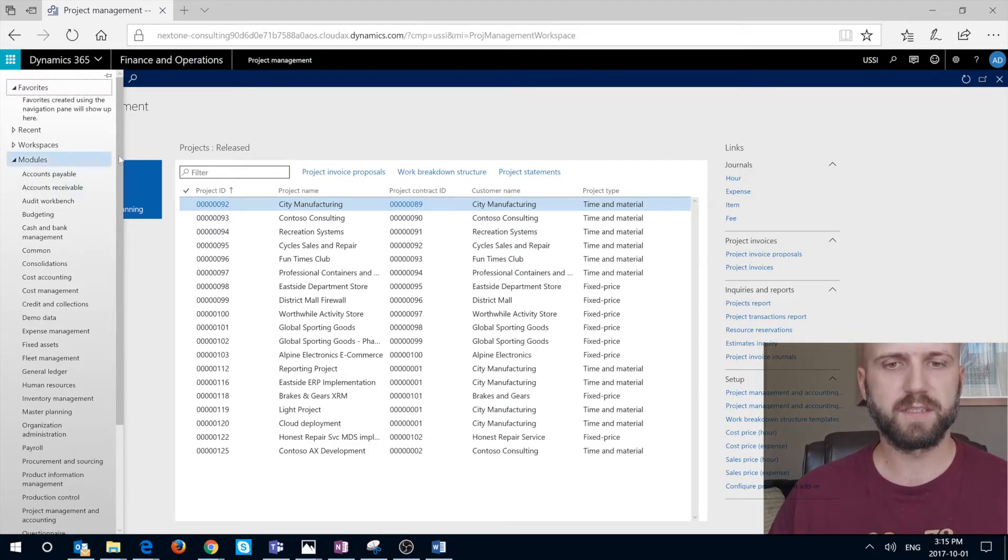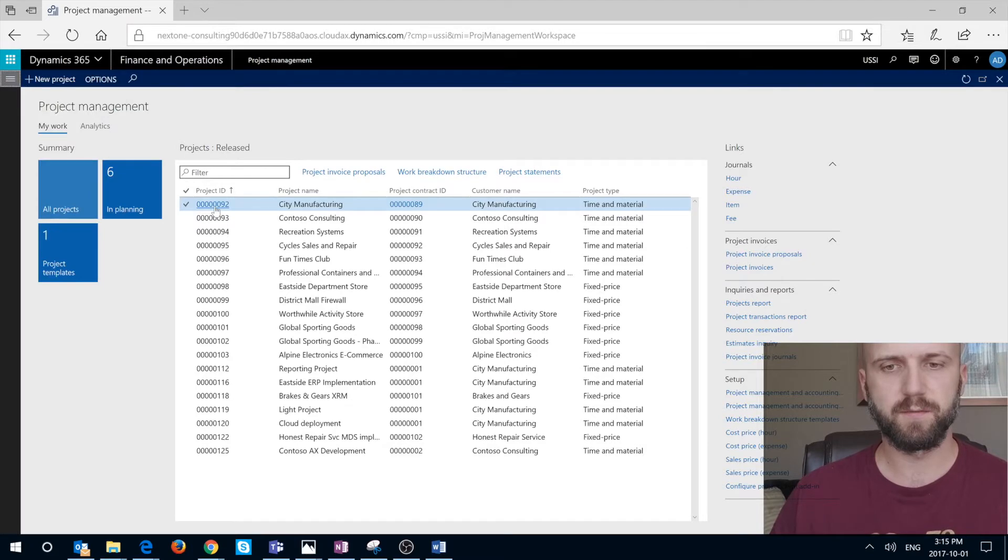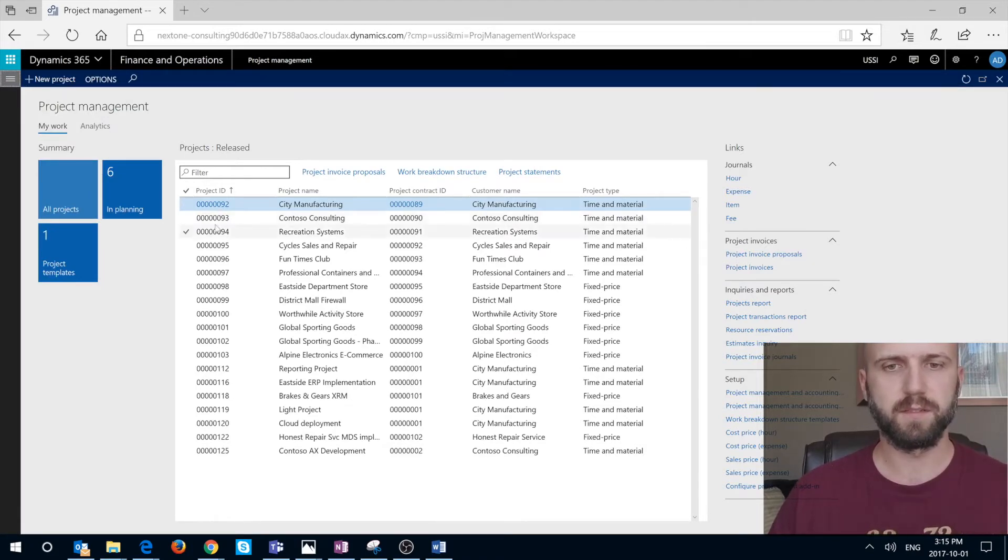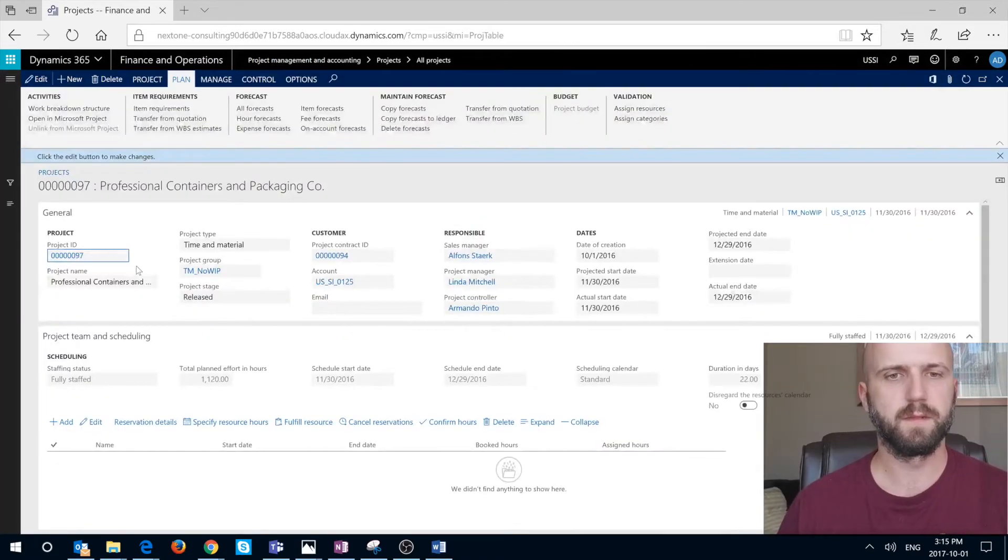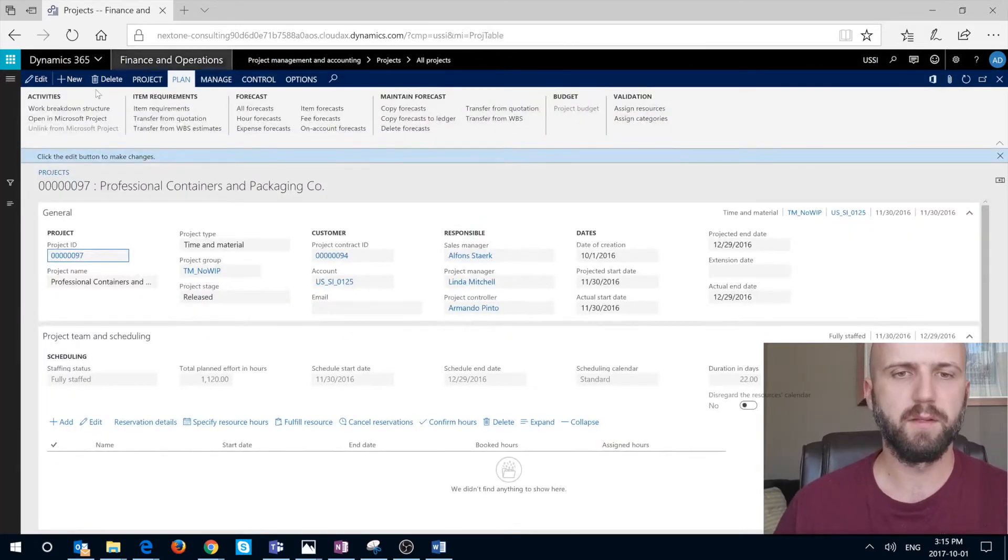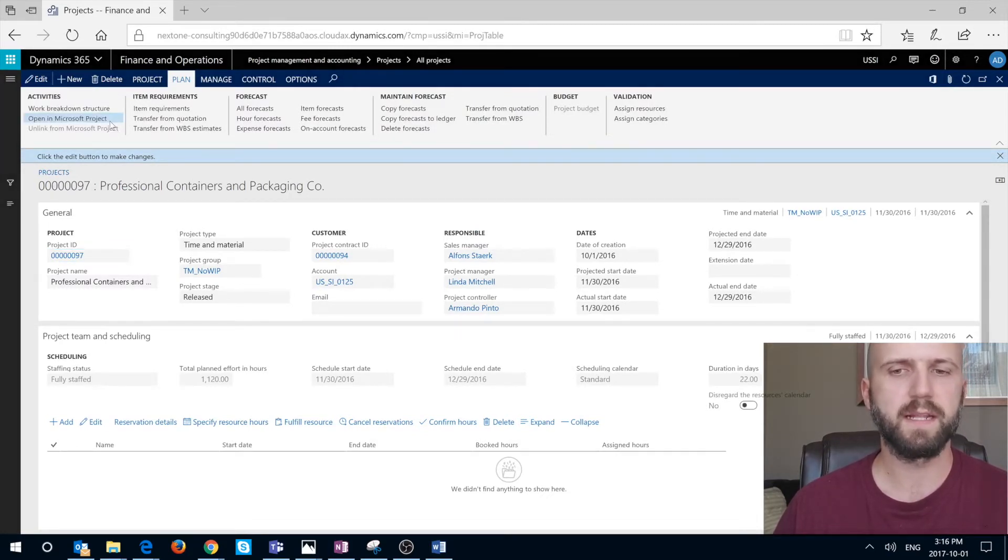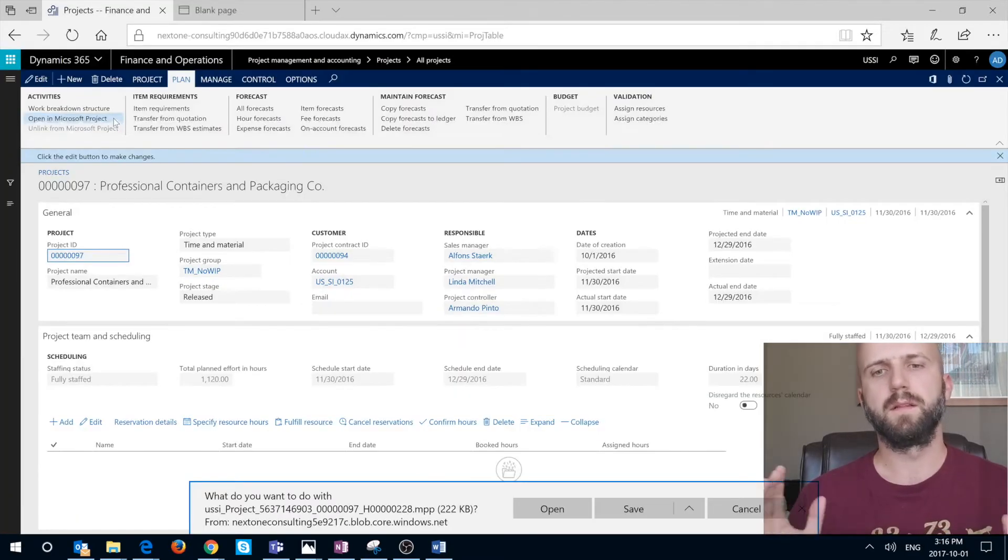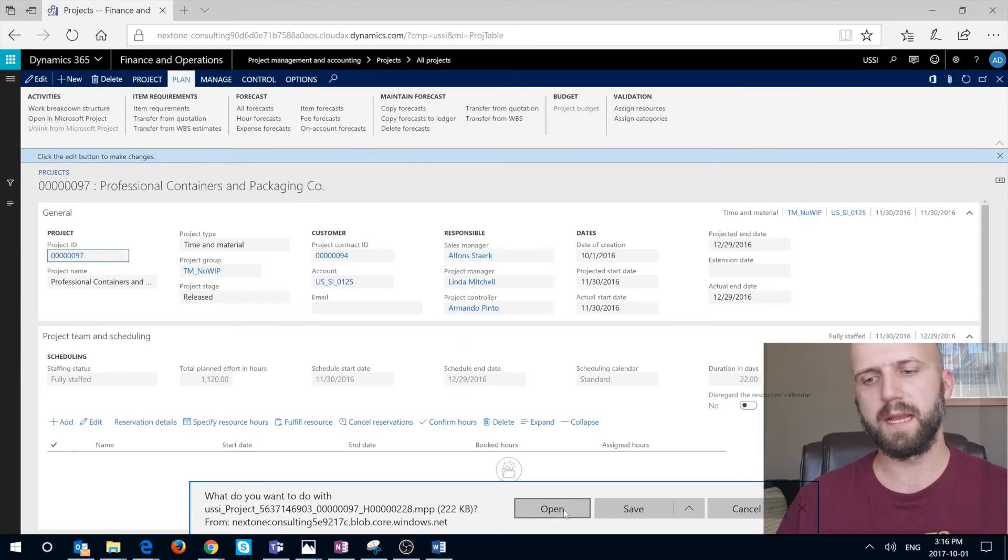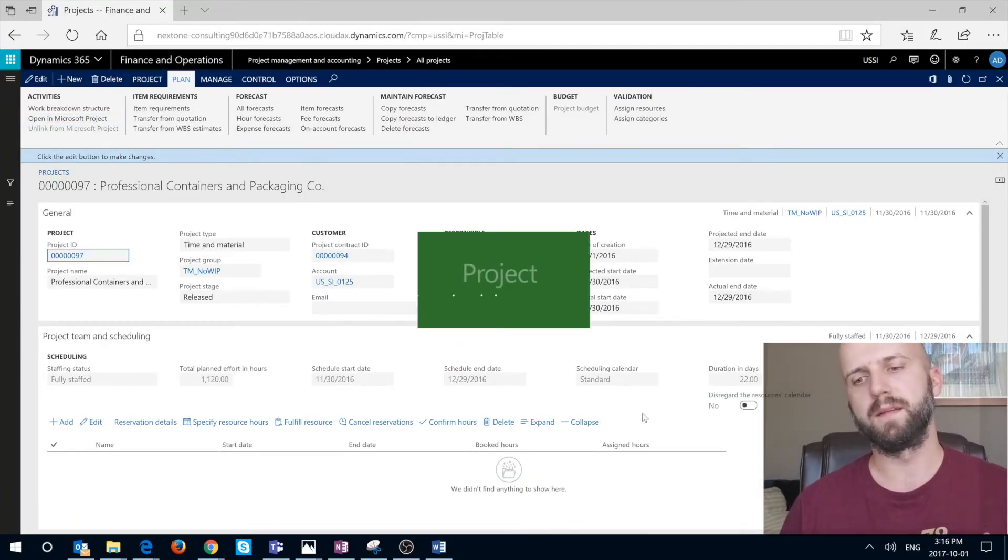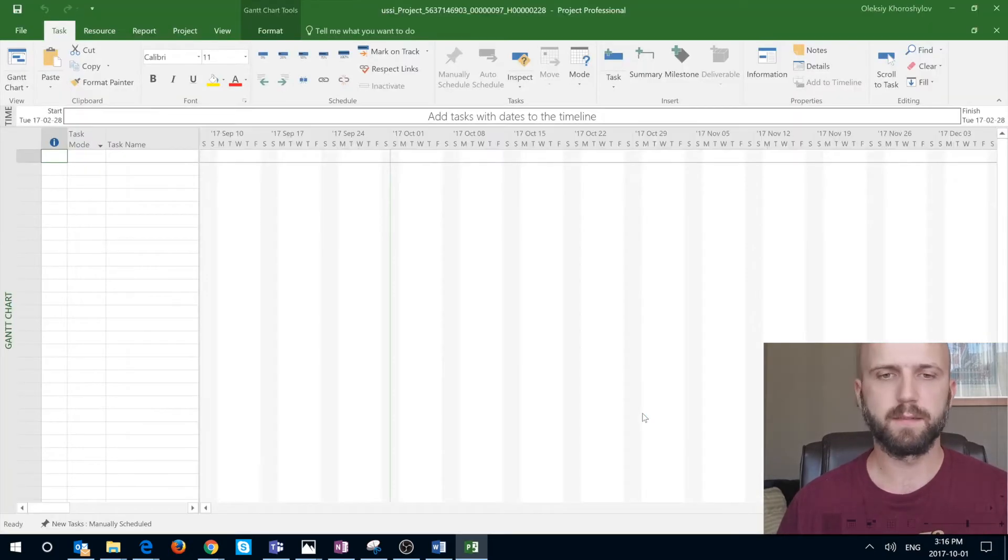For this you just have to navigate to the project that you're interested in. For example the CD manufacturing. I'm going to just click on it and you can click on this open in Microsoft Project link. Once you do that the Microsoft Project file will be downloaded and I can open it using my Microsoft Project client.